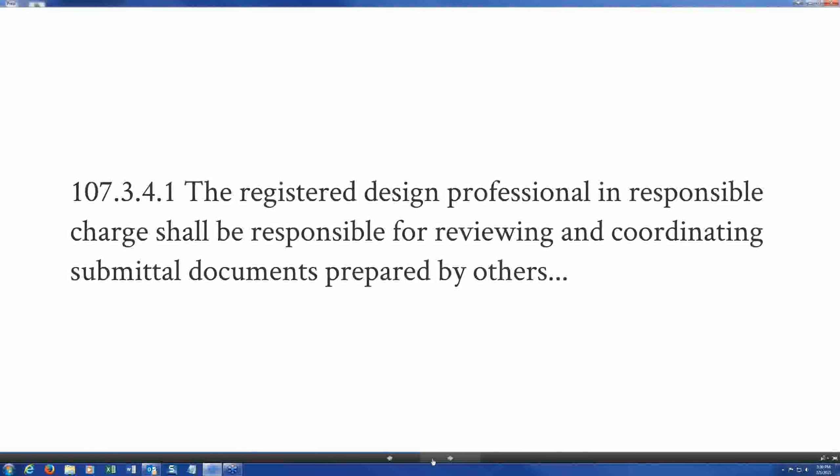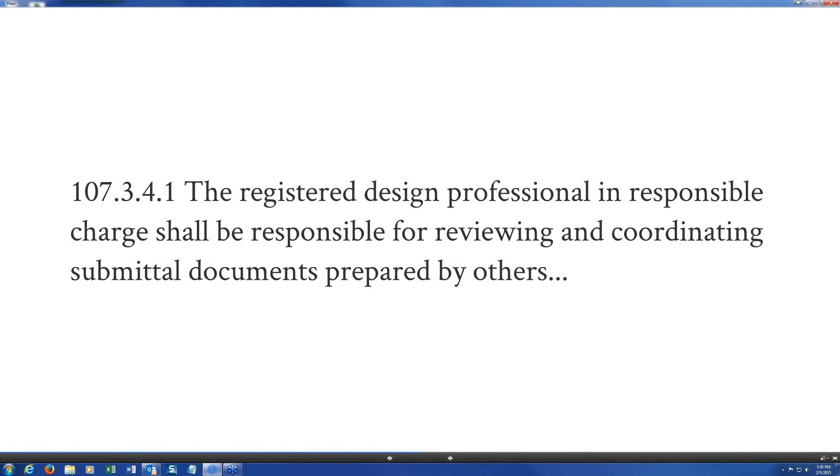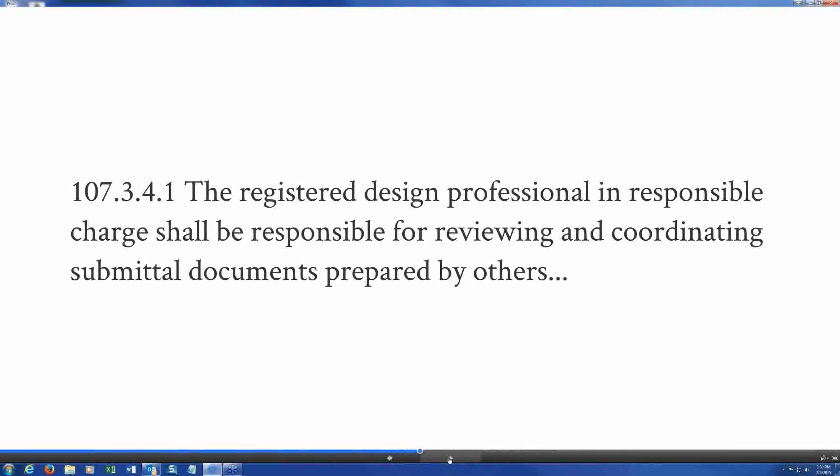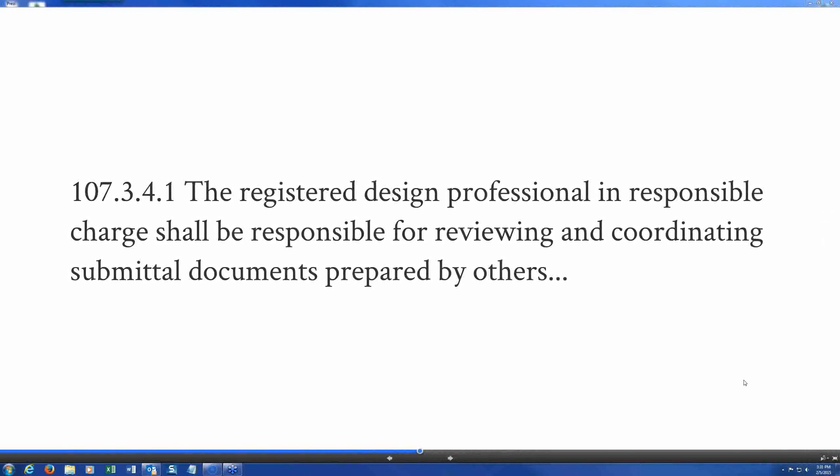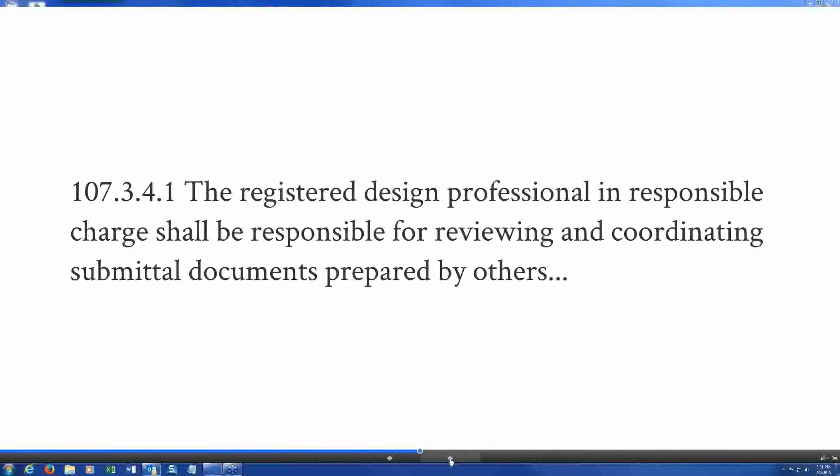The owner wants to hire them directly. But the problem is under the building code that's not overly legal. Somebody has to take this responsibility for reviewing and coordinating submittal documents, again whether they are prepared by the registrants as contract documents or prepared by the contractor as shop drawings. And that takes a certain amount of time and it takes certainly a liability risk and ought to be compensated for. But that's a footnote, a sidebar. So a question for you from your friend Tommy Lewis. Oh he's not your friend anymore? I wasn't going to say that, but Tommy is both of our friends. So are deferred submittals considered contract documents?